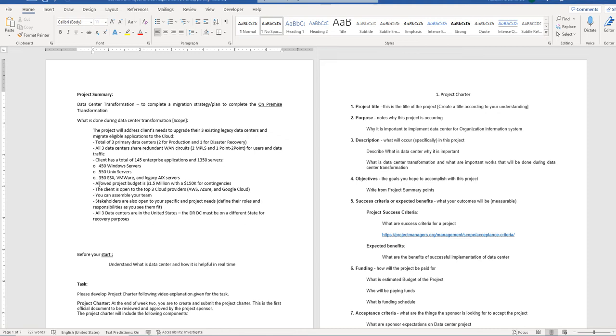And when you speak about finances, we say that the budget that is allocated to the project is 1.5 million, and if some risk or some adjustment is to be done, contingency budget will be used. Means 10% of contingency budget will be used for the power. For example, your allocated budget is completed, and if you can't continue with the work, this contingency budget can be utilized. Okay, so remaining all are very basic details regarding the data center.